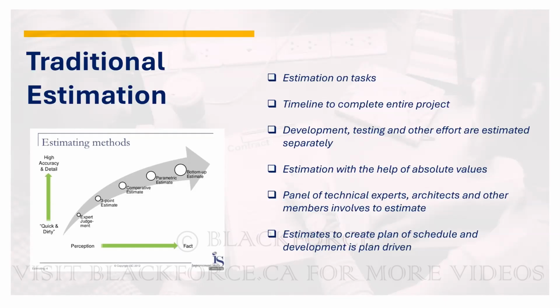We also do something we call bottom up. Bottom up is where you go into the details of what you want to do. You write what it will cost you. So let's estimate by time. Let's say we want to build a house, I'm just giving an example. For us to do the foundation, it will take us 3 days. For us to put the first floor, it will take us 5 days. For us to do the second floor, another 5 days. For us to do the ceiling, 3 days. For us to do the painting, 1 day. By the time you add everything together, you can say, oh, it's going to take us 15 days. You are doing bottom up. So these are the normal ways we do estimation.